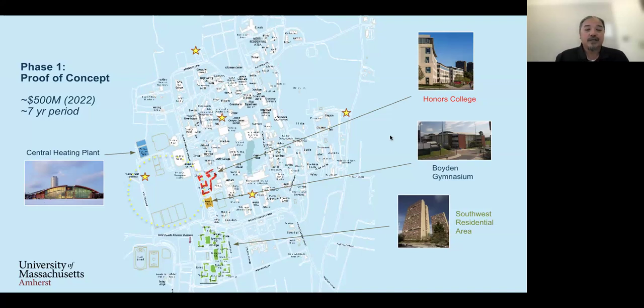So this kind of surprised us, actually, realizing that this high level idea of promoting ground source heat exchange, heating and cooling throughout campus, it just simply wouldn't work throughout UMass, because we just simply don't have enough land, open land, to implement the wells and implement that technology. So we realized at this point that we needed to pivot and find other ways to decarbonize.